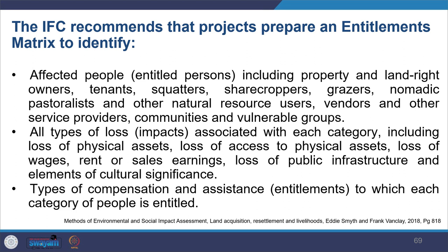You might also revisit the legislation part, which we saw for Indian context. Then all types of loss, what kind of impacts are happening from each category, including loss of physical assets, loss of access to physical assets, loss of wages, loss of rent, sales, and loss of public infrastructure, elements of cultural significance. All types of loss have to be identified. And types of compensation and what kind of support you're extending, that all has to be included.